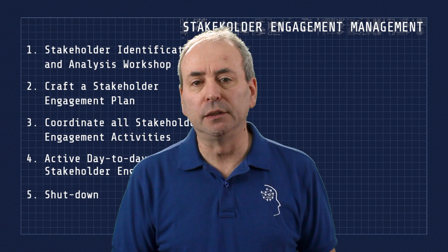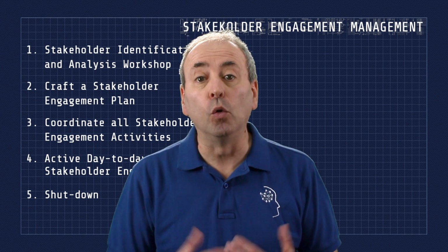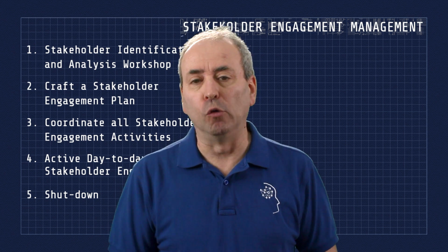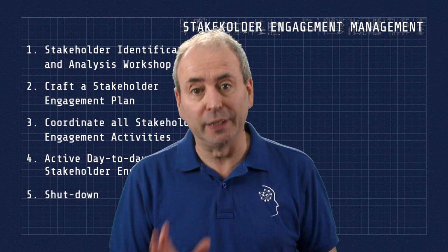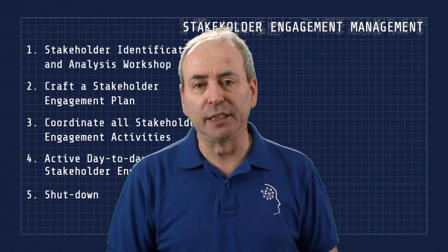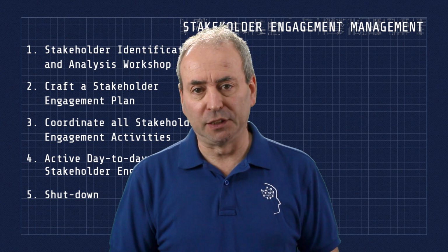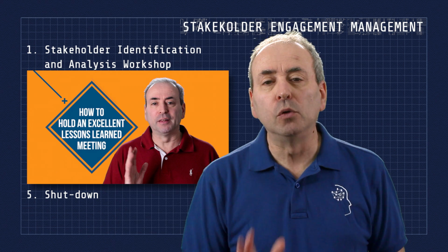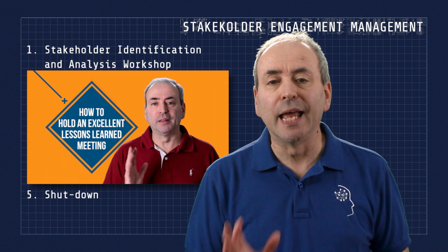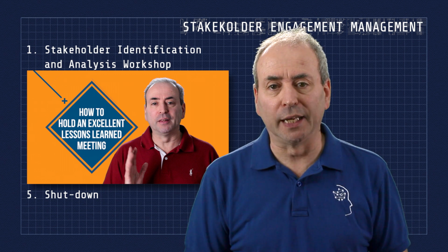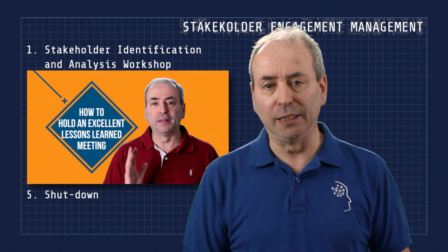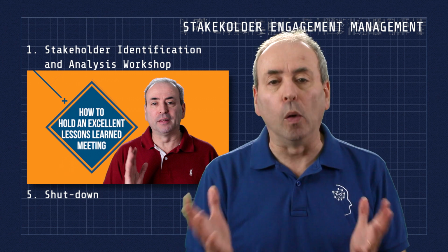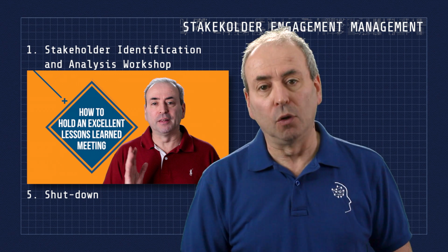Information and records need to be either archived securely or destroyed as appropriate. Whatever choices you make need to conform with any data protection regulations or legislation within your jurisdiction or within the various jurisdictions that the project operates within. I also recommend that you close with a lessons learned or retrospective process to examine your stakeholder engagement. This may be a standalone process, or it may sit within the wider project lessons learned review or retrospective.